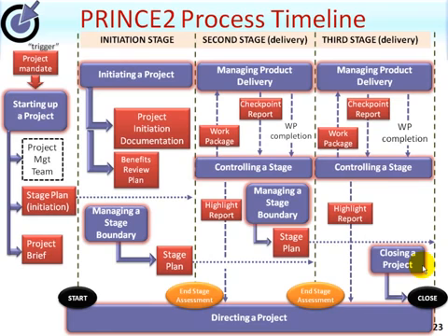However, the project manager will issue the project board with a recommendation to close the project, because ultimately it's the project board's authority using the directing a project process to decide that the project should be closed. Do you recall that the project mandate was issued by corporate or program management? Well, the project board will have been keeping them informed on a regular basis also. It's the project board executive's responsibility to do that, and in particular to advise corporate when the project has started, when the PID has been signed off and hence the project has been authorized, and when the project has closed.